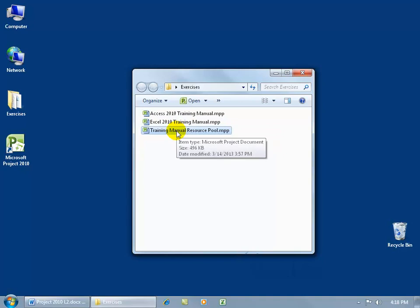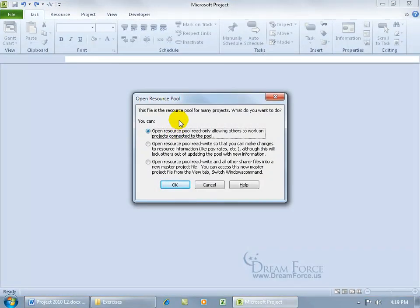Let's go ahead and open up the resource pool. When you double-click, a dialog appears because this file is already linked to one project. It says this file is the resource pool for projects. You can open it in read-only mode, which allows others to work on their project plans linked to the pool, or in read-write if you need to make changes like pay rates, which blocks other sharer files from updating it themselves.